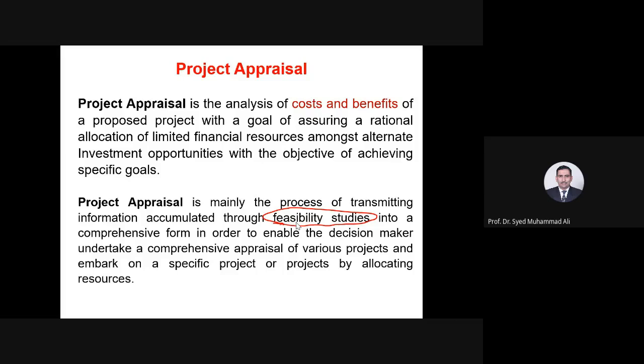What is the vehicular count? What is the population being served? What are the areas through which it is passing? Is there any issue of land acquisition or not? Is the land acquired? What is the cost of land acquiring?